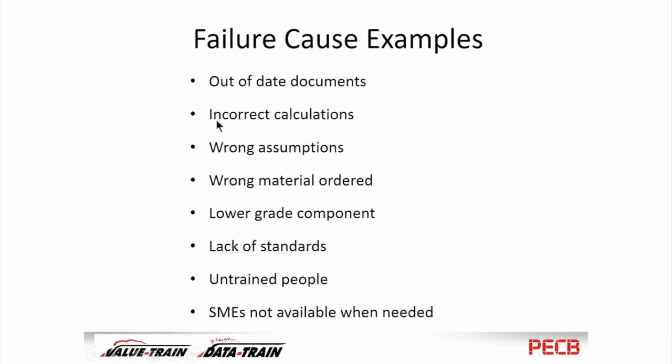By the way, while I'm looking at the slide, in case I don't remember it later on, calculations can be wrong, and that's certainly the case. The calculation for this overall risk assessment is nothing but multiplying three numbers together. So it's as trivial a calculation as you can get.